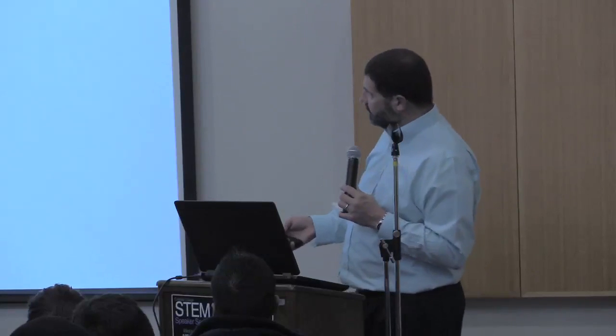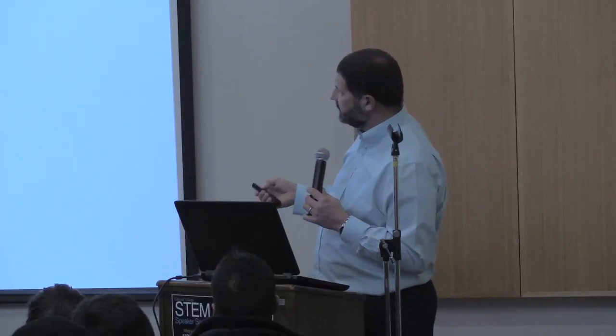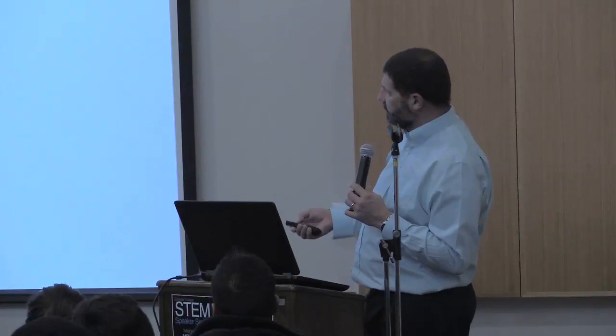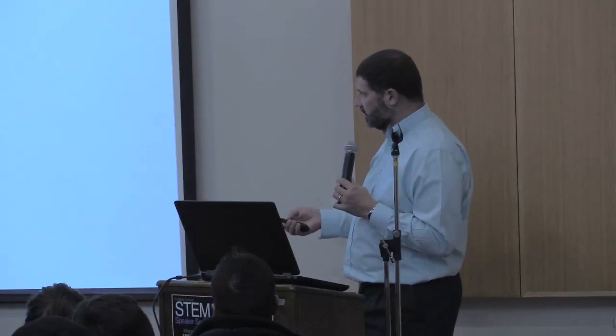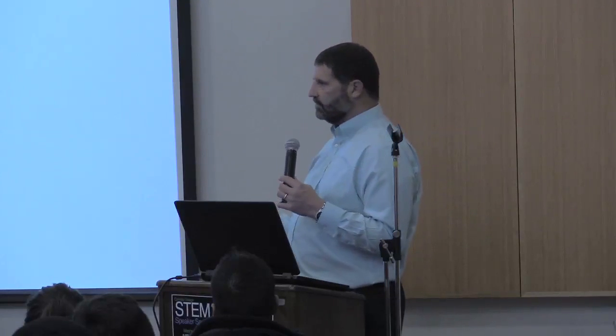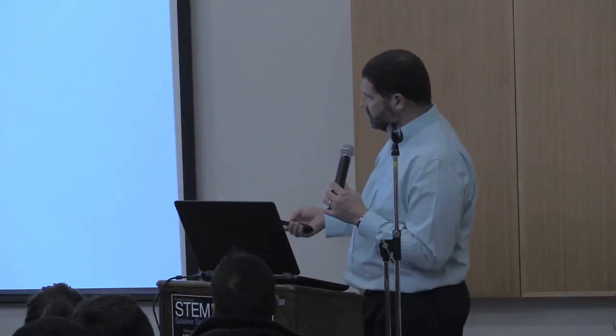Meetings, okay. Common meeting types. A project definition meeting where we figure out what we're going to build, schematic architecture review, PCB design kickoff meeting, scheduling, PCB placement. After I get done with the placement, I say, hey, this is where I want to put all the parts. Is that good? If it's not good, then I'm going to have to move them before I tack them all in. I finish the routing, we have a final review, and then a post-mortem is where we figure out what went well, what didn't go well. And I like to say that the value of a meeting is usually inversely proportional to the number of attendees.